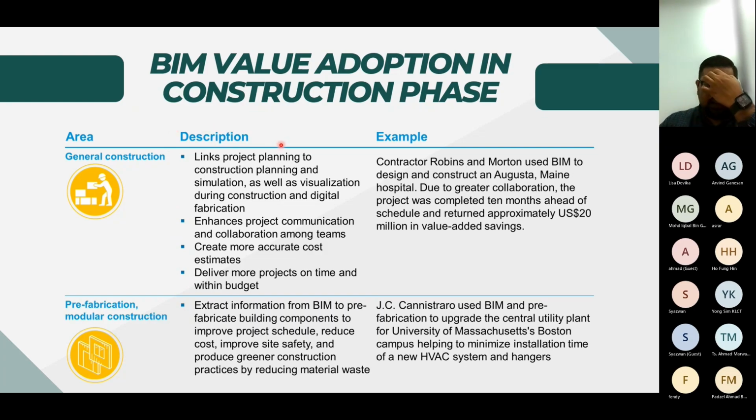Okay, because the subcontractor or the trade contractor or the specialist normally, their awareness about BIM is very low, and some of them are also restrained financially, which makes them ignore the BIM implementation. So I think for a few projects, our current projects right now, we are encouraging the main contractor to take the lead. For example, for the planning, construction planning, and then collaboration.